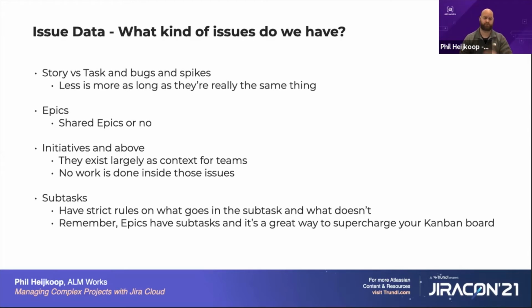But most of the time, and this also applies to epics really, no work intrinsically is done inside those issues. So the work itself is going to be done on that story or bug level, and you're going to roll up things like how much budget's been spent, how much time has been logged, all those things.